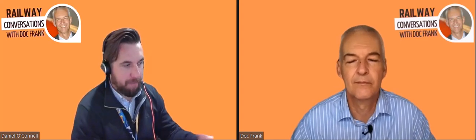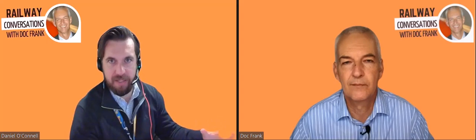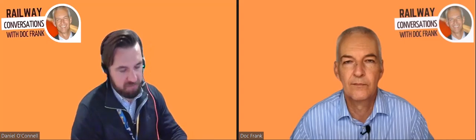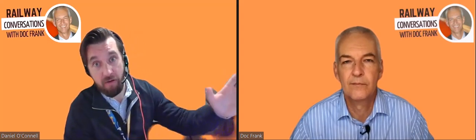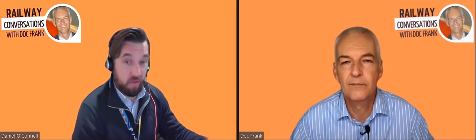And what I mean by that, in my mind, there's eight key principles to dynamic testing. If I look at it from a railway solutions perspective, there's what we would call the low speed joint proving test. So the first time you put a train into a new piece of infrastructure, you validate that the train fits, so the kinematic envelope. You'll validate that the pantograph would fit to the rigid overhead conductor bar or the OHLE,